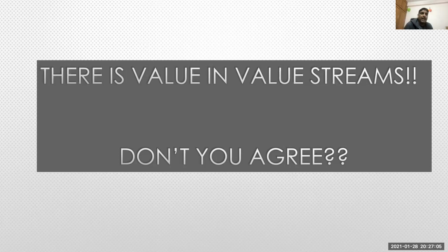No, no. See, planned value, or the business value, is given when you are planning. It's PI planning, and you say, I'm committing to these three objectives. Business owners give you a planned value based on their hypothesis, based on what they see from the market, from the potential perspective. And when you actually demo how much the actual user will get out of it, they will give the actual value.